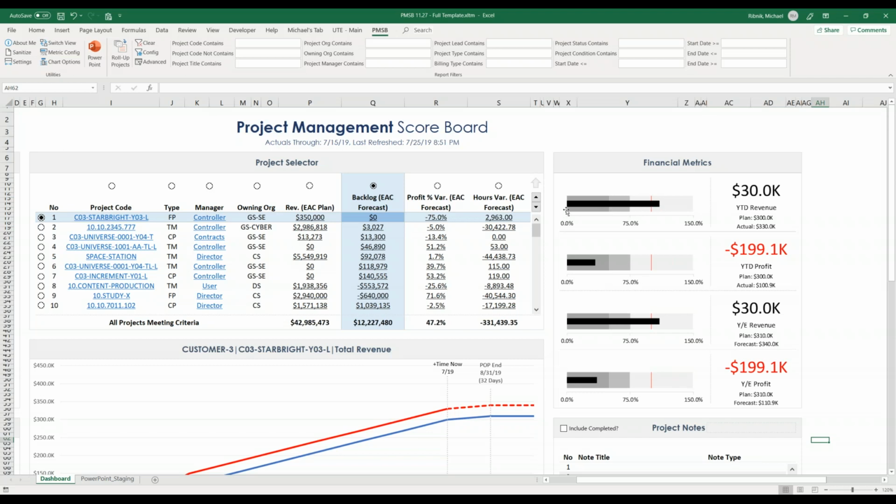And there are different shades of gray depicting 0 to 50%, 50 to 75%, and 75% and above. And so these charts are designed to let you very quickly scan and see metrics that are ahead or behind target, and to get an idea of the severity of that aheadness or behindness. So looking at this, it looks like I'm at roughly 110% of plan, roughly 35% of plan, again, 110%, 35%. And these are called bullet charts.